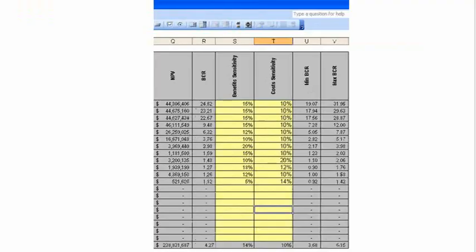And on top of that, we've got our sensitivity testing. Considering that there was quite a bit of uncertainty around the inputs, and quite a few assumptions thrown in, we've kept it fairly broad. So we assumed that the results can vary by about 50% either side in regards to capital and also in regards to the benefit side of it. So it gives us a range. But even though you've got a range, it gives us some certainty about where the projects are going to land.